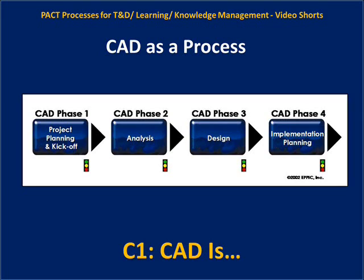A curriculum architecture project does not produce any new content. It simply analyzes the performance requirements of knowledge and skills, assesses existing content as to its availability to be used as is, or after modification, or not appropriate to this effort. It designs a learning and development path — a sequence of instruction, a learning continuum — and identifies both what already exists and where the gaps are. In Phase 4, those gaps are prioritized and priced for development and/or acquisition as appropriate.